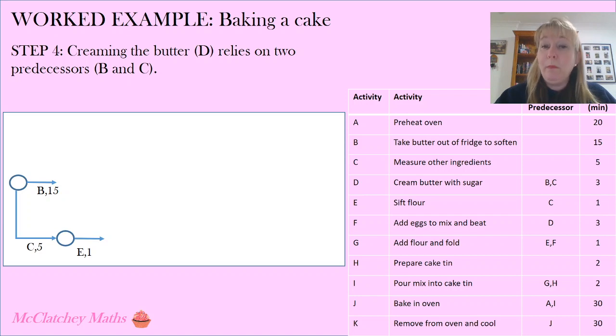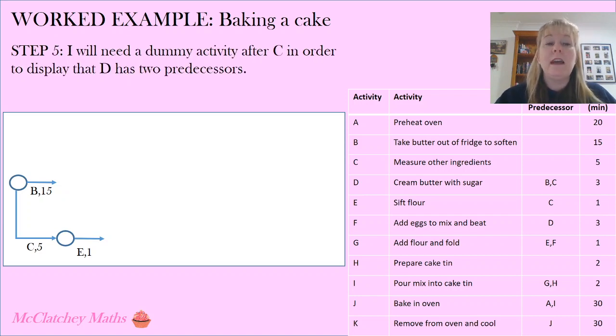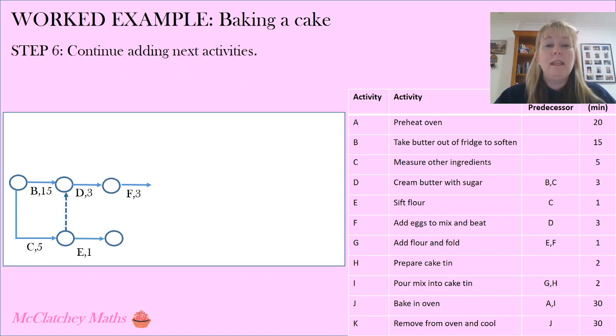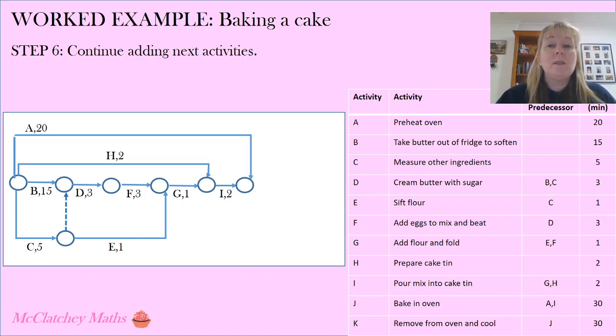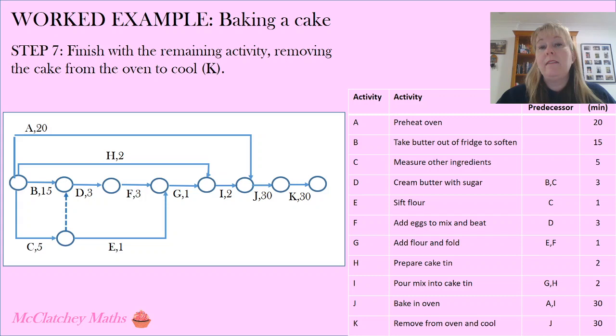Now activity C is a predecessor for sifting the flour. So we can draw that one in fairly easily. But creaming the butter relies on two predecessors, B and C. So here's where I'm going to put my dummy activity in after C so that I can display that information. And there's activity D coming out of there. Now I'm going to pop in my next activity which is going to be adding the eggs to the mix. And because that now creates the end of that parallel process C and E, they're all going to be putting the flour into the cake mix now. So we can bring that along and we're going to add that flour and fold it in. Now I'm going to start adding in those other activities that come out of my initial vertex. I've got activity H which was preparing the cake tin. And this is the point where I actually need to start pouring the cake mix into the cake tin. And I'm going to pop, preheat the oven in. That was my very first activity as well that took place alongside activities H, B and C. And now that the oven is hot, I can put the cake into the oven. And then I can remove it from the oven and let it cool and then eat it which is my favourite part.